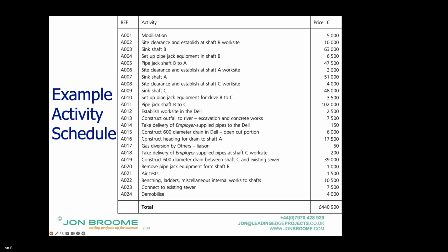So in terms of paying out, are you going to be paying out by the line item, or will it be paid based on what you finished in a month? It's paid, so you have your program. You visualize it. You have your bars in a program. Each bar has a sum of money attached to it. So you'd have a bar for mobilization. That program has those assessment dates going down it. If the contractor completes that bar by an assessment date, it gets paid for it. Strictly speaking, if it overruns by a day, it has to wait for another month to be paid.